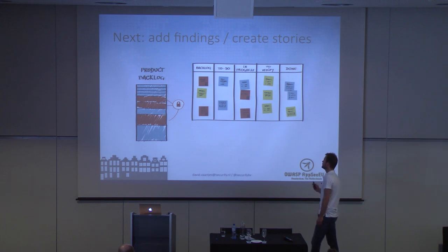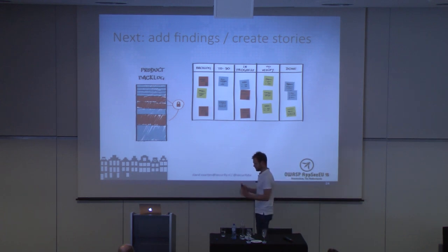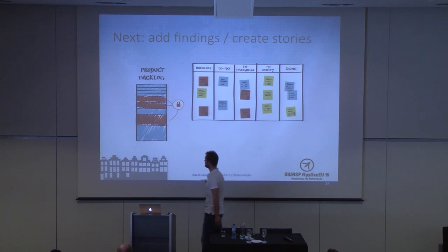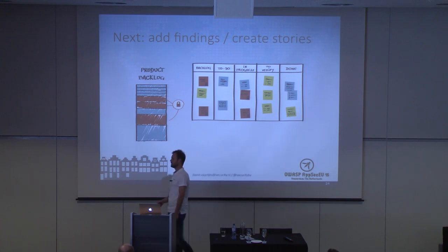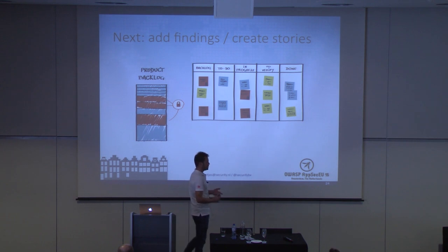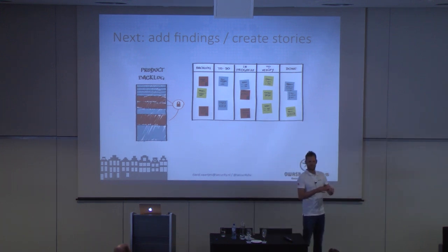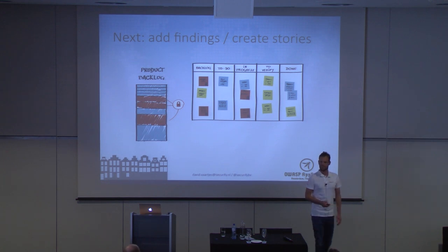So all the security findings we did, we just added them to the board, just as defects or security bugs. And for all the things that we think need structural improvement, like using a different XML parser, using a different templating engine, having choke points for input validation, using SAPI modules or whatsoever, these are security depth kinds of things, we just added them to the storyboard.